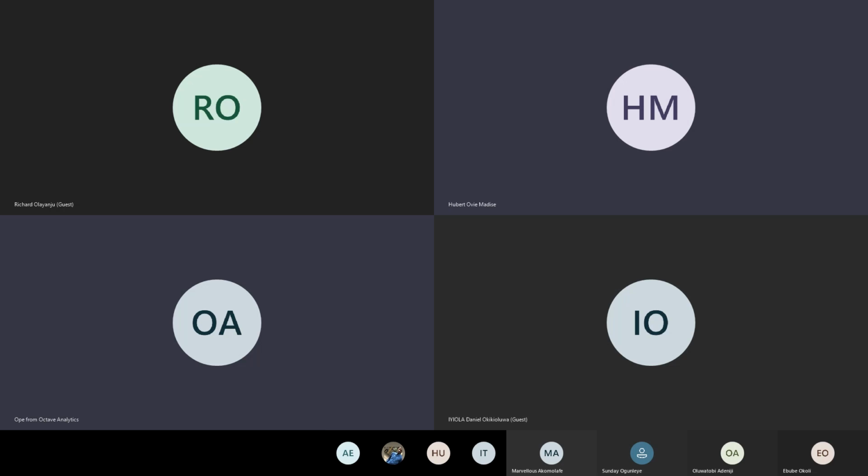Anyway, everyone has broken down the Gantt chart and the RASI model, but I also went ahead to do some extra study on the RASI model. In this particular material I saw that there could be variations from the actual model, which is RACI: the responsible person, accountable person, the consultant, and then the informed. This one I saw was a RASI with an S, where the S stands for support. These are people that support either the people responsible or people accountable.